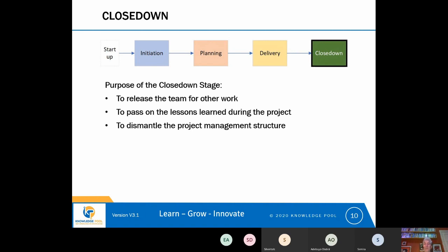And what that meant was in the close down stage, we had a list of all the things that we'd learned, and we could evaluate them to say, actually, what are the important lessons here? What do we need to pass on? Or what was trivial? And actually, it's reasonable for every project to have to relearn that lesson, because we're trying to make the organisation more efficient.